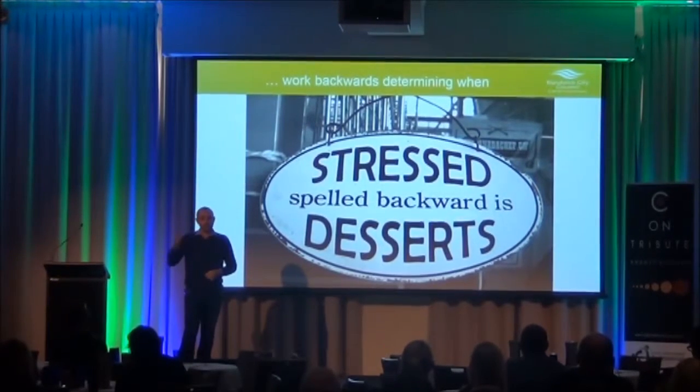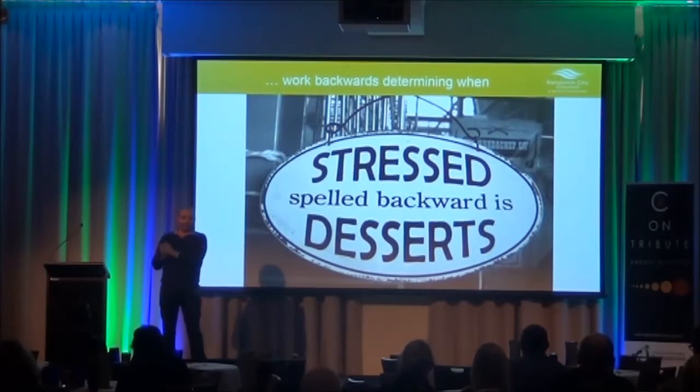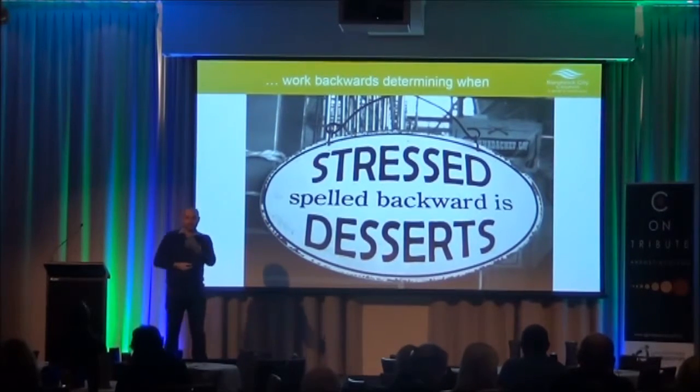Work backwards. So we book our auditors in, and then we decide when things need to be done, when it's being referred to audit by the council, and going back from there, so we know exactly what day things need to be done. I think that works best.